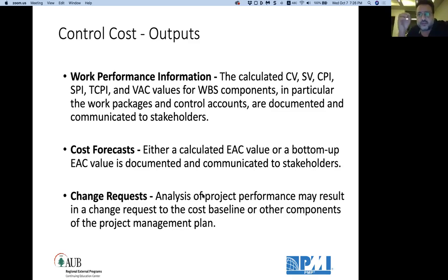Okay. Monitoring the cost, is it something we should do on a daily basis in the project? No. It depends on your cost management plan. If in your cost management plan, I'm going to monitor the cost on a weekly basis, I'll do the earned value analysis on a weekly basis, then it's on a weekly basis. Or if you say that at the end of the day I'm going to do it, or whenever I have a big expenditure incurred I'm going to do it. Okay. It's up to your cost management plan and your procedure how you are going to do it.